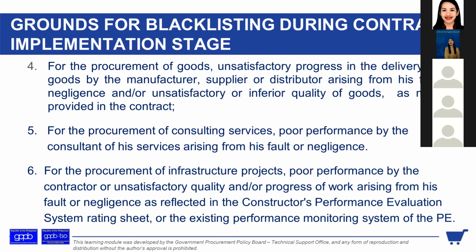That's the problem. That's why it's required for LGUs to have a team or a committee to check project monitoring. At least you will know the status, not suddenly find out it was not finished. You can see it if they're not following the Gantt chart. The slippage accumulates little by little. Now it's 3% slippage, next 2%, an additional 2, 5% already. They're backtracking, so that's what you look at.